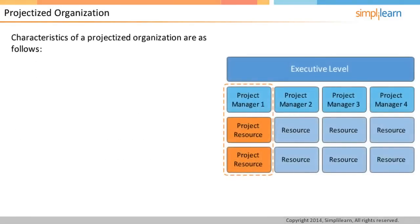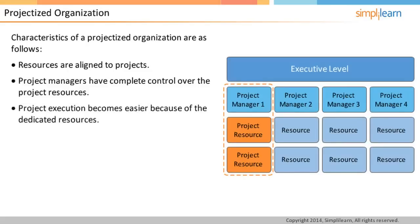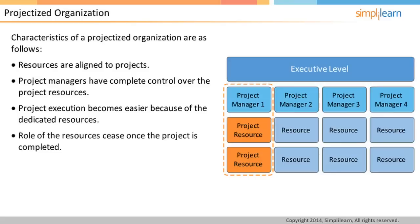The projectized organization has all the resources aligned around projects. The project managers have complete control over the resources working on their projects. The biggest advantage of the projectized organization is that the resources have loyalty to their projects and project execution becomes easier. This kind of structure is suitable for organizations whose work is in the nature of projects. There are few disadvantages in this structure as well. Firstly, the role of the resource is over once the project is completed.